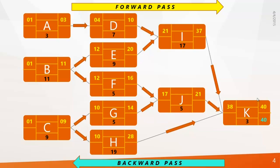Remember how we calculated early finish in the forward pass: we added duration to early start and deducted one. To find late start, subtract duration from late finish and add one. So the late start of activity K becomes 38. The equation is: late finish minus duration plus 1 equals late start. For the next level — I, J, and H — to find late finish, deduct one from late start, so late finish of I, J, and H becomes 37.